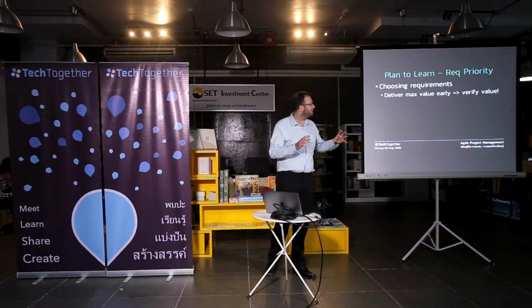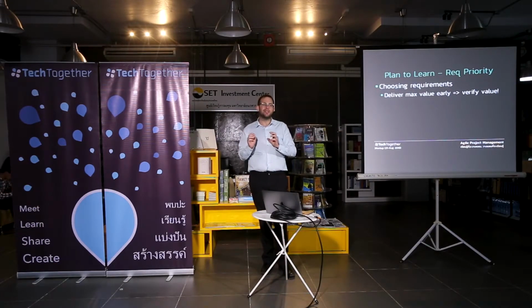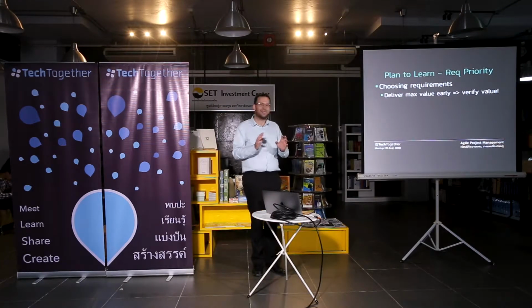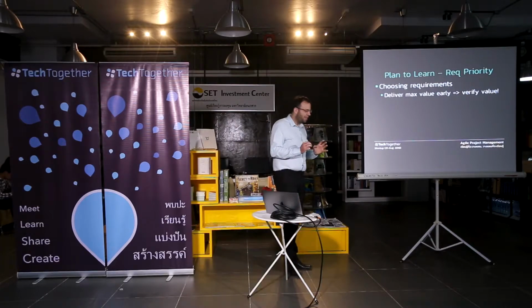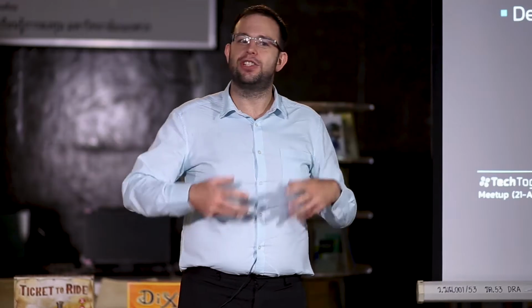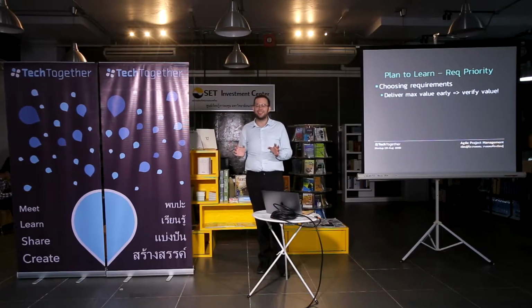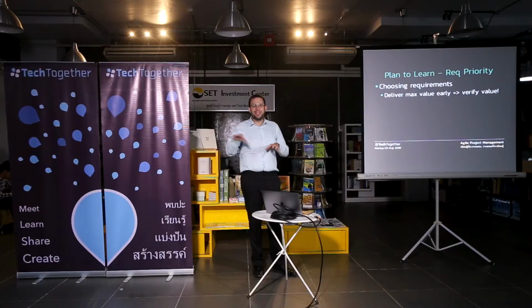You must deliver the highest value features early. So, do not look at your product and think... I see this actually a lot on my student projects. The first thing that gets delivered is the login page. I know this is a slightly contrived example, but if you're building a product, you need to know if that product is useful. Do not spend 2 weeks making a beautiful login page. You don't need to test the login page, right? You guys here in the professional community are laughing, but my students are crying because they spend months building these beautiful login pages and never actually build the app.